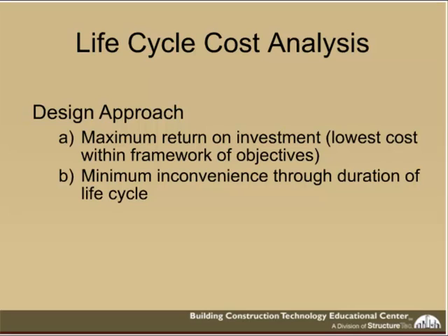So the design approach and life cycle cost analysis is a balancing act. It's trying to find what's going to be the maximum return on your investment, looking at the length of time that you expect to keep the building. Is it one that's going to be demolished in 5 years? Is it one you're going to keep for the next 100 years? We're going to compare that to the cost, but also to how frequently you can tolerate the inconvenience of restoration.